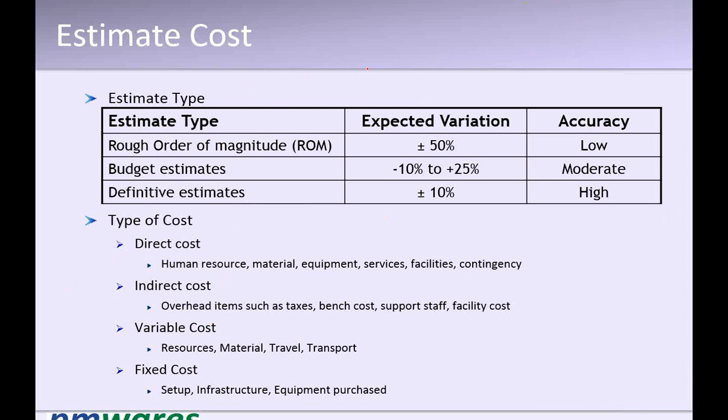Yeah, but if the resource is going for any specific training from outside the premises, or if you are especially arranging facilities, in that case, would the facilities also be part of the cost of the same project? Look at the intent. If it is done especially for your project and will not be used for any other purpose, it's a direct cost. If it is a general facility made available to you for this work also, it is an indirect cost. You will not have to pay the complete cost, but you have to pay a factor of that cost.